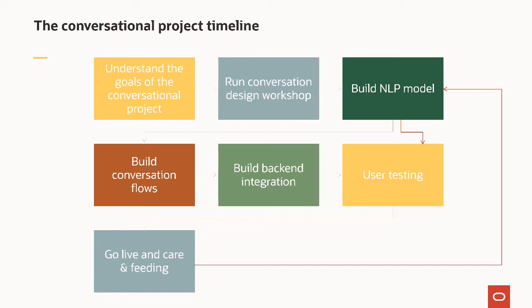There's more to it from a user acceptance test, and as I mentioned, some subjective things. All in all, the outputs of these steps can be used to feed in an iterative way, right? So from the output of user testing, you will take considerations and potentially do another iteration until the business is happy and ready to sign off.